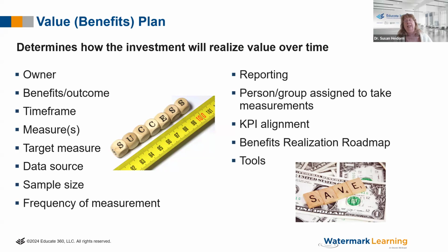If you think about productivity in itself, what happens to productivity when people are learning something new? They don't get faster, they get slower. And because sometimes that's not understood, I have seen projects be discarded because people said, I thought this was supposed to be an increase in productivity and people are slower than they used to be. Well, if you measured at 3 months, measure maybe at 9 months when they get used to it and can do it in their sleep again like they could the old system. Yeah, they're going to get faster. But you've got to set that expectation, because people always think, it's been implemented, where are my productivity gains? Let's be realistic. You're not going to get productivity gains immediately.